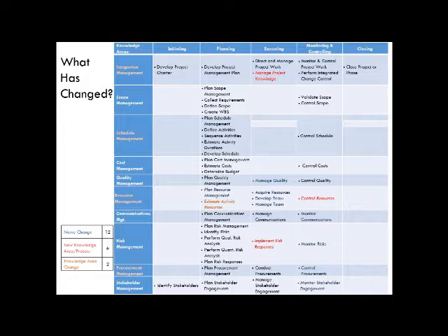In terms of processes, it's still the same 10 knowledge areas. We have one important new process, manage project knowledge. So that's all about lessons learned. The PMBOK gave too much of an impression that we gather lessons learned at the end of the project and then they disappear into a black hole. It's a constant discussion in the global community about how do we really embed lessons learned in our organizations. And so PMBOK has now covered that gap by embedding manage project knowledge as an execution process.